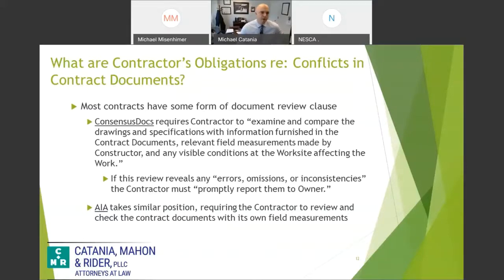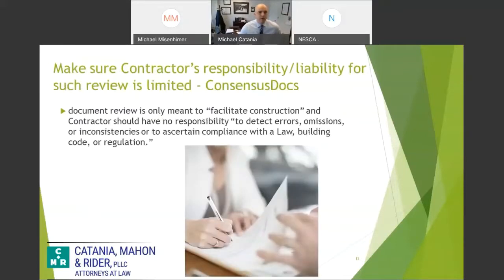Of course, the question comes up in both of these situations, well, what if you don't? Importantly, with ConsensusDocs, I think this can shift into an improper delegation of design. You're a contractor, your means and methods, you should not be tasked with reviewing the plans to make sure they meet code, or anything that has to do with design or engineering aspects.